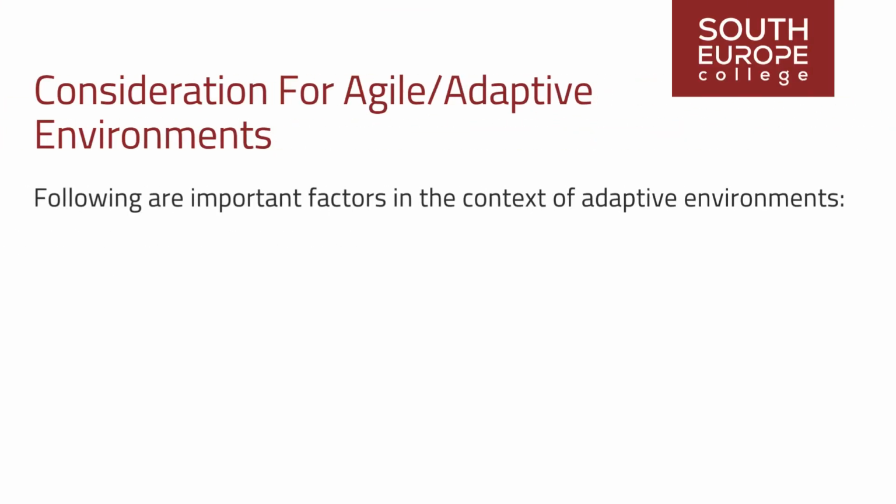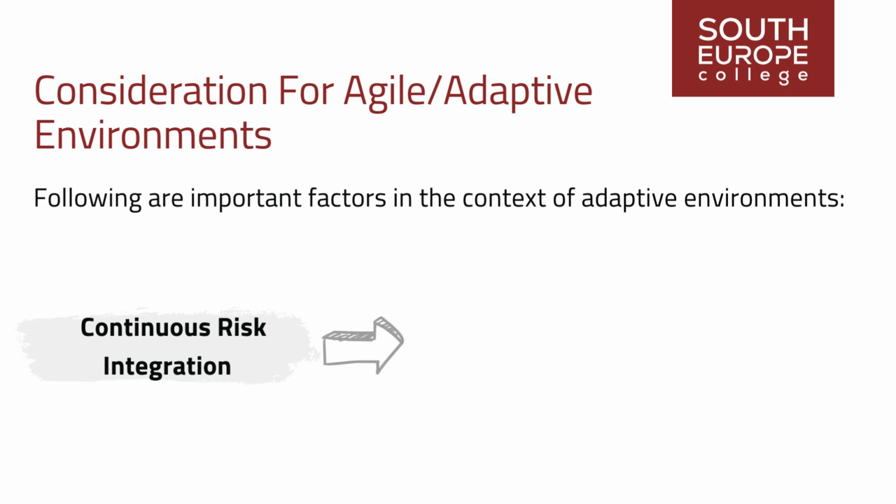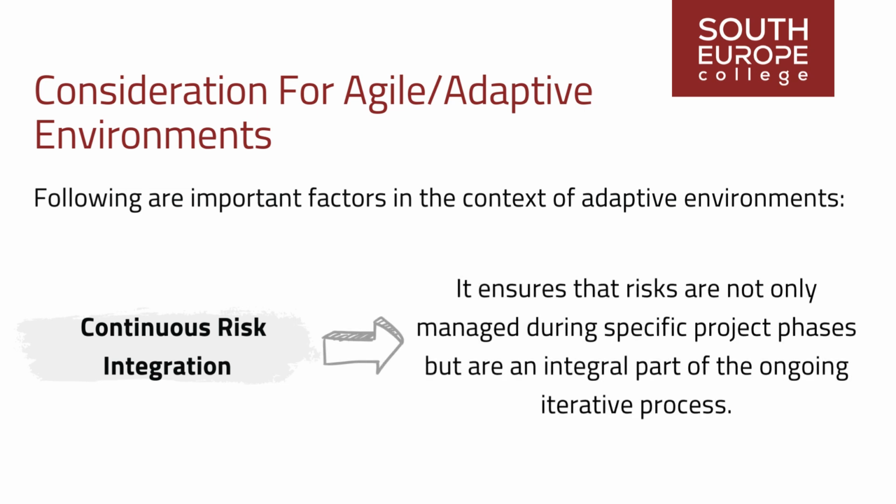Following are important factors in the context of adaptive environments. Continuous risk integration. Risk considerations are seamlessly integrated into the selection of content for each iteration. This proactive approach ensures that risks are not only identified, analyzed, and managed during specific project phases, but are an integral part of the ongoing iterative process.